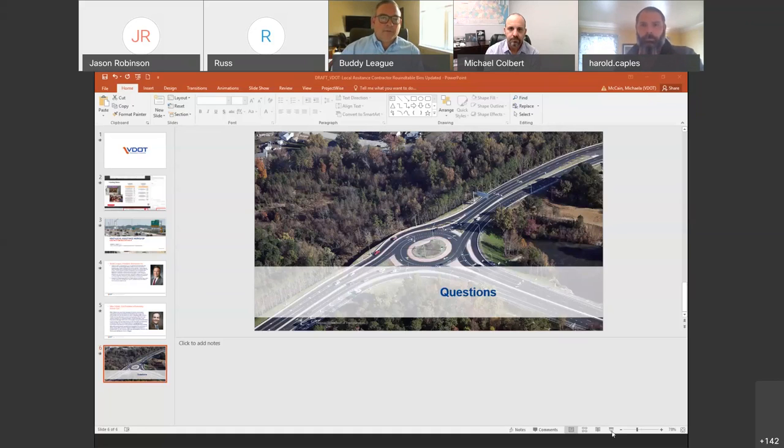And so everybody knows what we do: we may have a schedule of units and quantities that we're working off of, but I know Branscome does, and I'm pretty sure that Branch does as well, we take that job off again, so we know from a project perspective where those risk items are. We know where those quantity differences are, and we address that in our pricing.